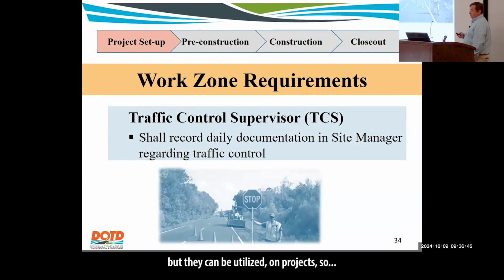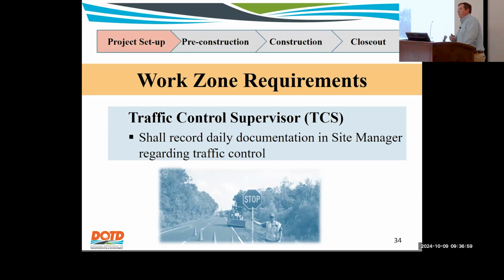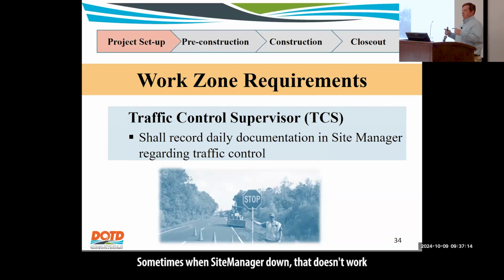All right. Again, they have to record this daily in Site Manager. It's not technically Site Manager. We use the Site Manager credentials. There is a separate traffic control program that our IT group created for us. So it's kind of separate from Site Manager. So when somebody says traffic control diaries is down, that is a separate program. Site Manager should still be running. Sometimes when Site Manager is down, that doesn't work because it uses your credentials and your contract authority from Site Manager. But if it is down, they are required to do a paper copy of the traffic control diary.